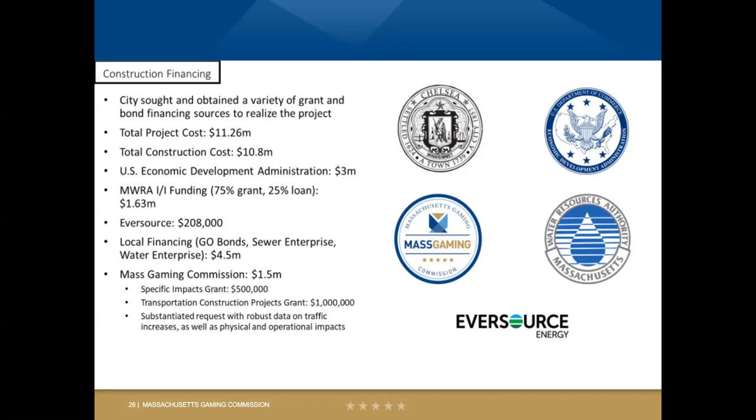So for those of you that are considering financing for considerably high cost infrastructure projects, for reference, our project cost was $11.26 million, and we were able to put together financing from the U.S. Economic Development Administration through a grant program, as well as MWRA INI financing, Eversource, and local financing.